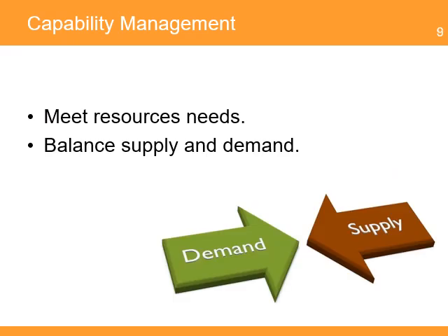This domain helps balance the organization's capacity and capabilities, especially when there are more demands from programs and projects. It ensures that all programs and projects have the resources they need, especially the support from functional units such as procurement and finance. It helps manage the demands from new programs and projects with the actual resources. In this domain, the portfolio manager provides an analysis of the supply and demand and forecast analysis of demand based on portfolio pipeline analysis. This helps understand the resources needed against the current available capacity.